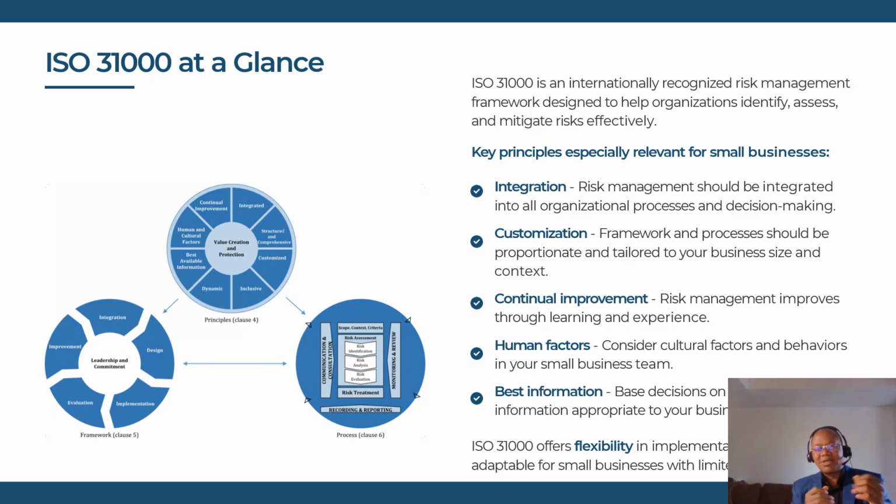When we identify the risk, we create a risk register, which is just a list of all what could go wrong when we ask the what-if questions. Then we go to risk analysis, where we use either quantitative or qualitative methodology to quantify the magnitude of the impact and likelihood of the event occurring. Then we do the evaluation and profile a solution to the problem, and we move on to the next stage.